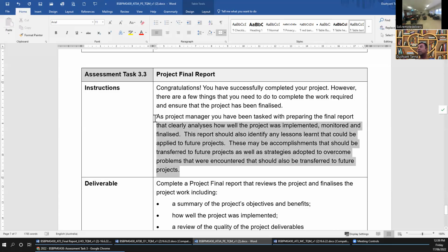So it's what you are doing as a project manager when you are finalizing a project. You prepare that, oh, we planned about it and we got it right, or we didn't get it right, and why? What could have been improved? What could have worked well? You might feel like, oh, you gave us 3 staff, but we definitely needed 5, so everyone was constantly under pressure of work. Or you say, oh, you gave us 3 staff, but we didn't have enough work, so everyone was always chatting. That was too overstaffed. Something like that.